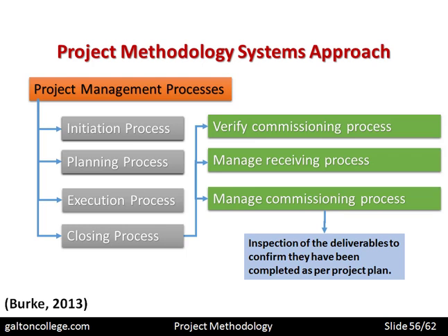Manage commissioning process. Well, inspection of the deliverables to confirm they have been completed as per the project plan. So the deliverables, the outcomes of the project should be inspected. And the outcomes may be a particular service and how the service is going to be performed in practice.